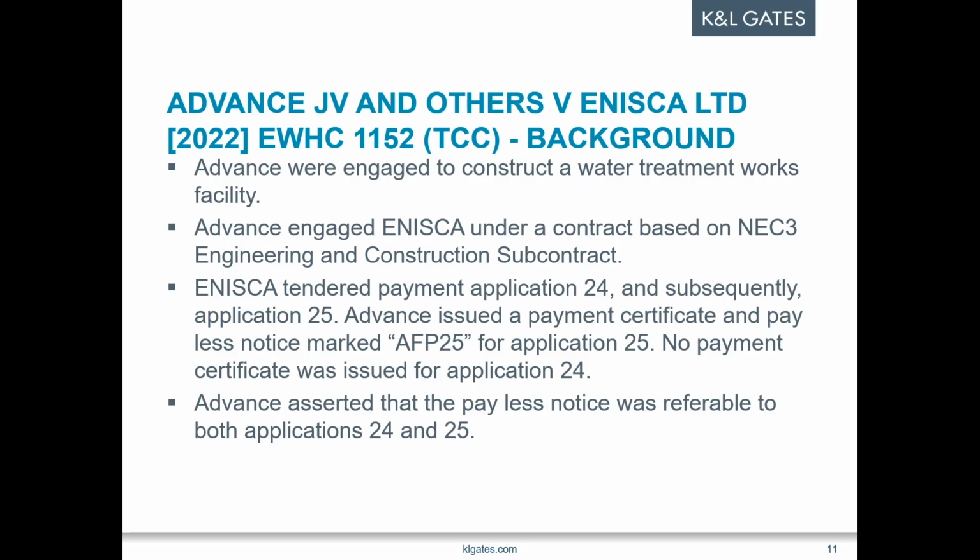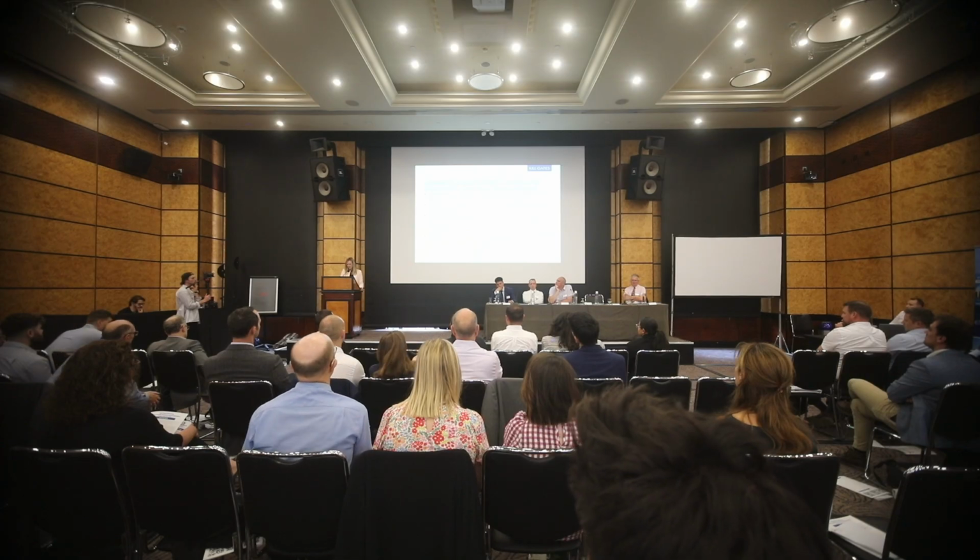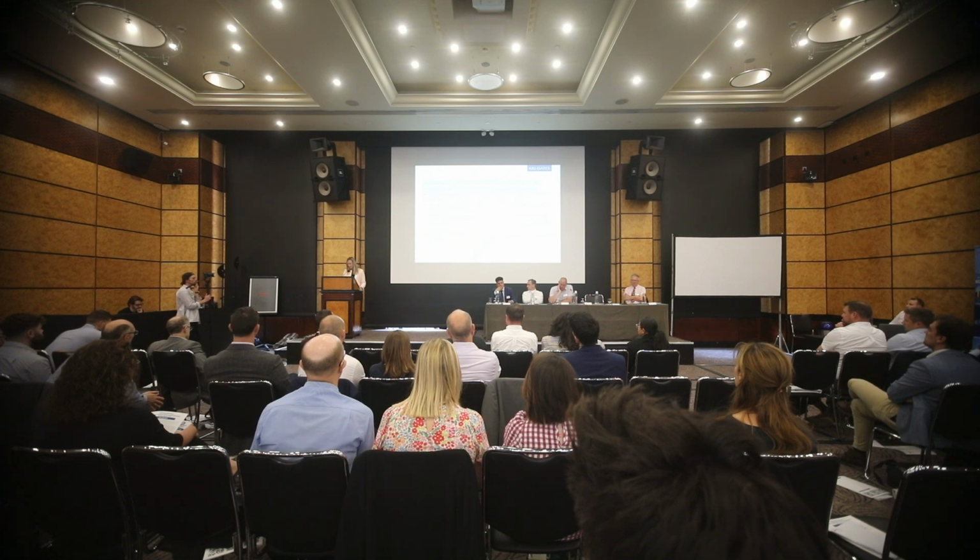On the 19th of November, which ties in with the next assessment date under the contract, NEC submitted application 25, an increase of around 85,000. But the net payment included in that application referred to 2.7 million. So that was including the 1.4 million that was in the previous application number 24.